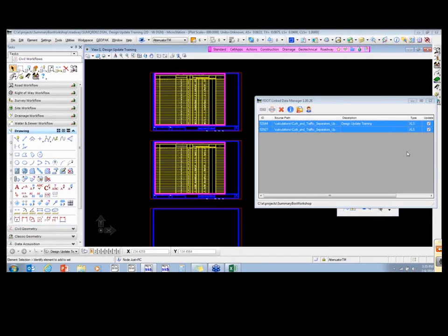Well, say it's 3 miles. Well, I did however many feet. I did 750 or 1,200 feet today. Well, that would equal this amount. It's something that is easy for construction to figure out. But to create a shape that includes medians and all my irregular areas, that's just too much. It does need to be broken down. And I hope that answered that question.